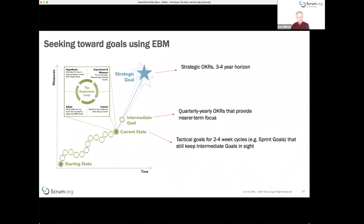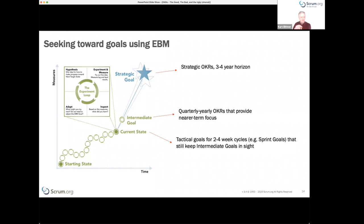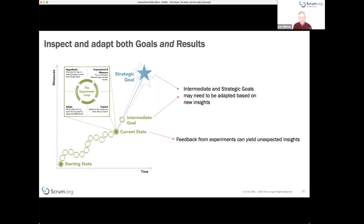We use the definition of done, acceptance criteria, feedback from stakeholders, or feedback from the product owner to determine whether we're building the right thing. We deliver to customers so we can inspect whether we achieved what we set out to do, then adapt and repeat the process. That hypothesis-experiment-measure-inspect-adapt loop is a generalization of what we do in Scrum, applied to a more general set of problems.